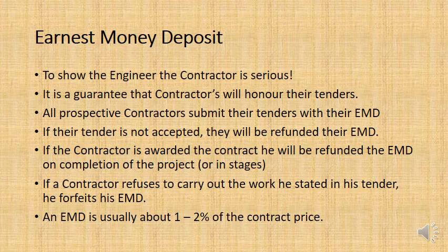Because remember, the contractor does not need to accept his own tender when he's been awarded the contract. No, he's already signed the acceptance letter when he submits the tender. All that is waiting is for the buyer, the engineer, to sign the acceptance letter. So that's why we have earnest money deposits.